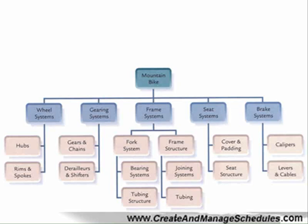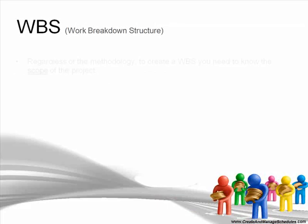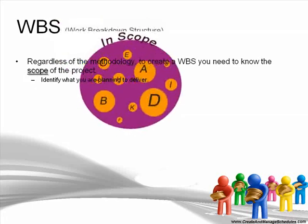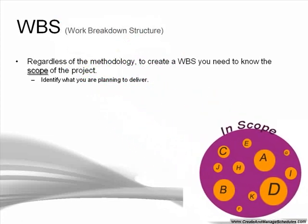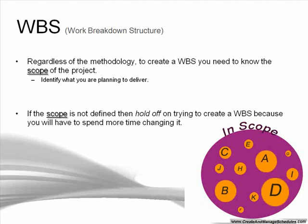The smaller components will be easier to identify the duration and the work, as well as assign resources. Regardless of the methodology, to create the work breakdown structure, you need to know the scope of the project — you need to know what you're going to be doing. Identify what you plan to deliver; that's the scope of the project. If the scope is not defined, hold off on trying to create a work breakdown structure, because you'll have to go back and spend more time changing your schedule.